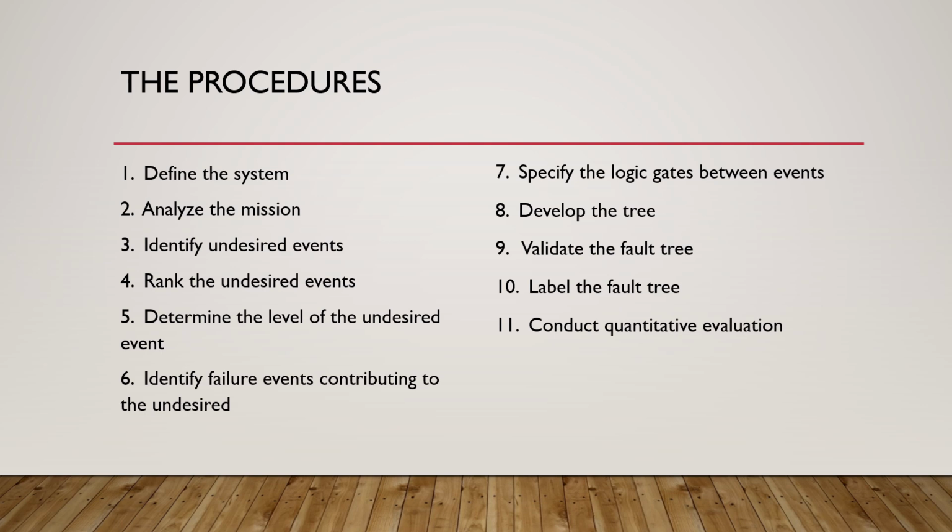Once the fault tree diagram is complete, the tree is further validated, confirming its accuracy. The tree is then labeled in hierarchy from top to bottom, beginning with the sequence of A through the necessary combination of letters and completing the tree. As necessary, users then conduct quantitative evaluation from the top down, determining the probability of failure for each event, while considering the frequency or likelihood of a failure event. Each event is then further classified to determine the possibility of correction or remediation.